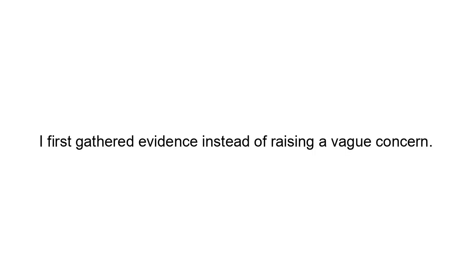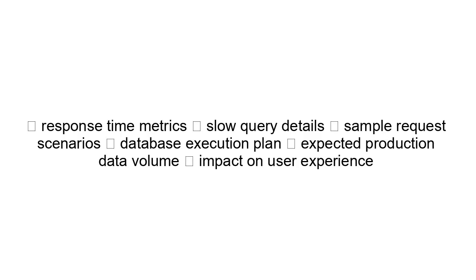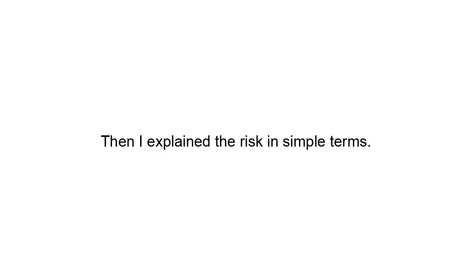Action: I first gathered evidence instead of raising a vague concern. I collected API response time metrics, slow query details, sample request scenarios, database execution plan, expected production data volume, and impact on user experience. Then I explained the risk in simple terms.